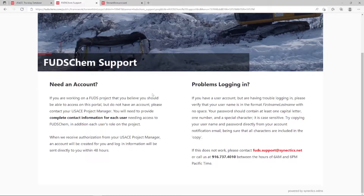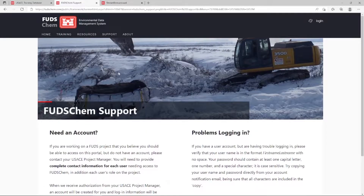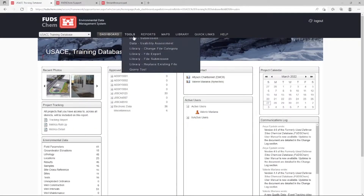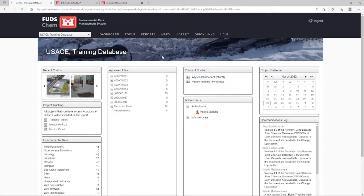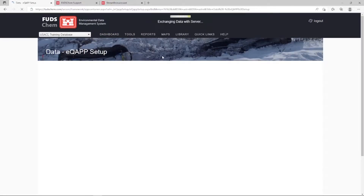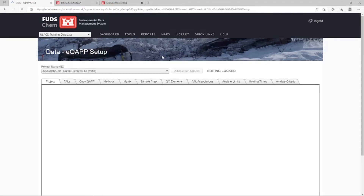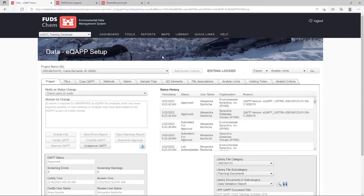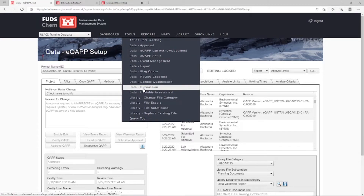For more information, please refer to our FUDSCHEM permissions overview video, linked in the description. The first step in FUDSCHEM is creating an EQAP and establishing locations. We recommend both of these steps to be completed 90 days prior to sampling. However, your project may require a different timeline. We'll discuss the general workflow for these steps in this video, but please refer to our EQAP playlist and our Loading Locations tutorials for how to complete these steps.